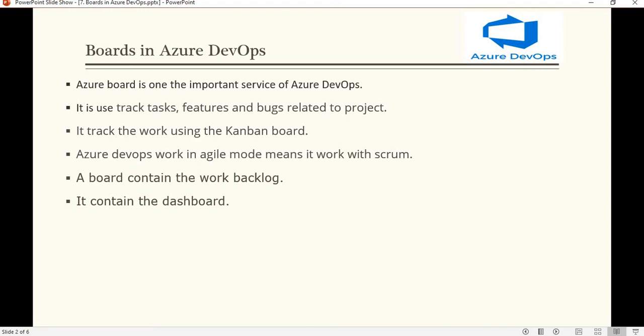Azure DevOps works in agile mode, meaning it works with Scrum. Basically, Scrum is a time period of work — there is one sprint, and a sprint is basically 15 days. In Scrum, every day we get the status of the work item — whatever the developer or tester has taken — the status of that particular work item is checked every day.